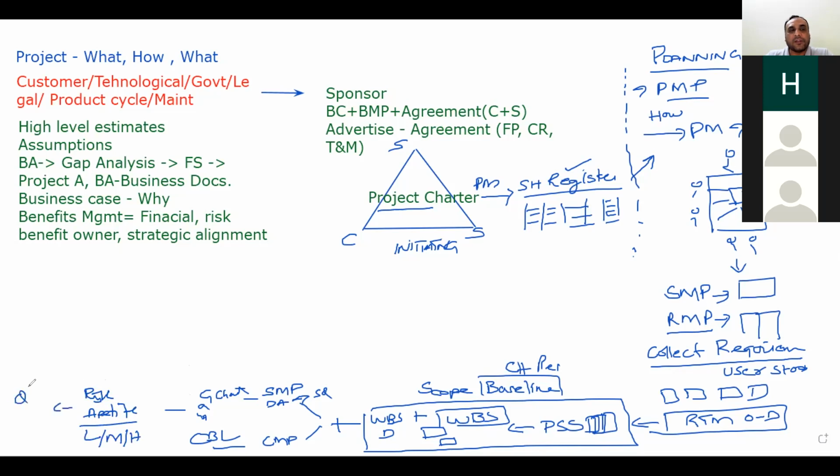And when all the risks, or possible risks, are identified, we will sort them out with the help of qualitative risk analysis, with the help of the risk ranking matrix, or what we call the project risk impact matrix, where we have all positive and negative risks, and we arrange them from low to high. So we can classify low, medium, and high risk.